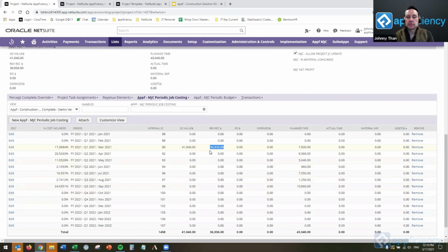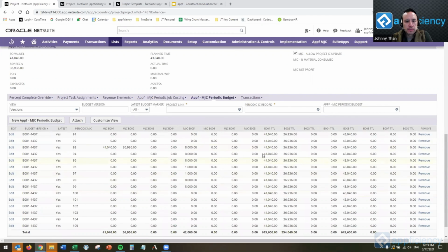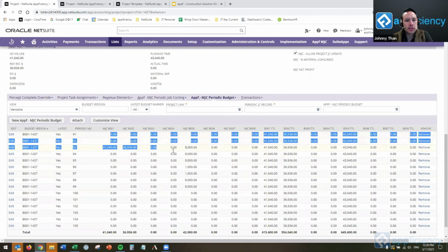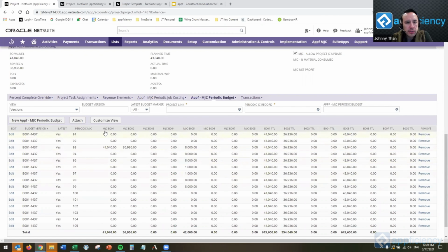We can look at RevRec that's posted and not posted, and we can have that revenue recognition based upon earned value or cost-based progress. How do we do that? Well, we use the capabilities here that we see in the periodic, and we drive something called the cost incurred percentage. The cost incurred percentage comes directly from a periodic budget. So the budget represents, in the first 8 columns, everything that matches directly with our other 8 metrics, which was the order, revenue, so on and so forth.